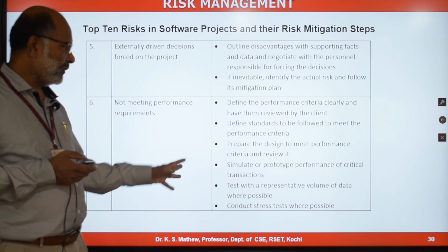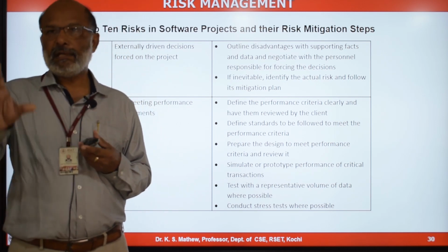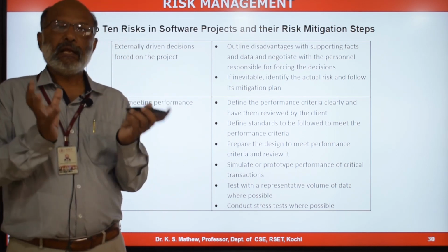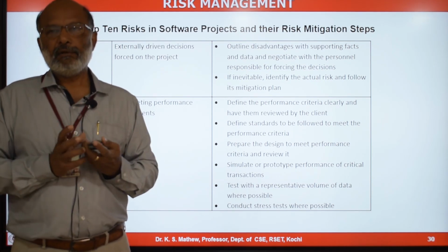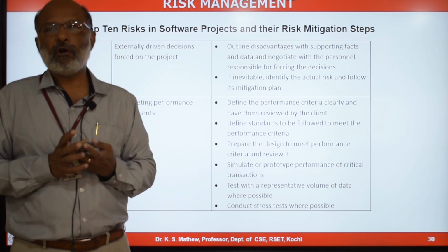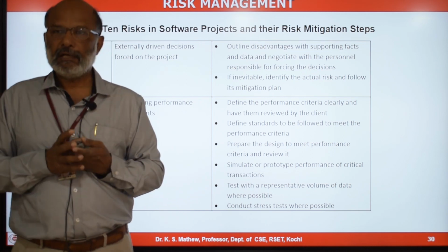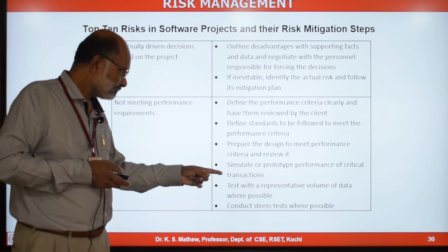Simulate or prototype performance of critical transactions. If the performance criteria is related to a particular component, before going ahead with the development, you can have a proof of concept or a prototype or simulate that particular module in a simulation environment and test the performance before actually going ahead with the development. That will help you to reduce the risk related to the performance.